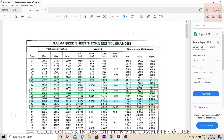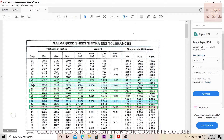As you can see, this is the table which shows the details of a galvanized sheet used to make an HVAC duct. You have the different gauges, the thickness, the weight, and the thickness in millimeters and inches. We basically need to know the gauge of the duct being used, and from the gauge we can find out the unit weight.